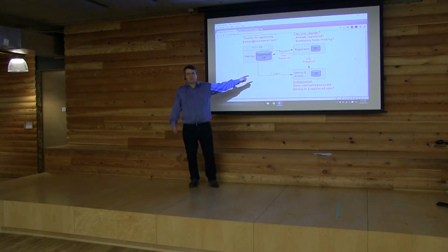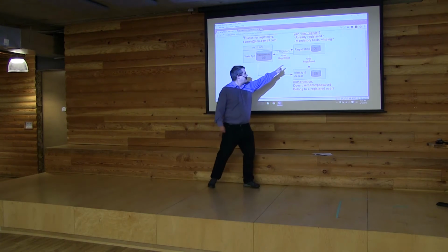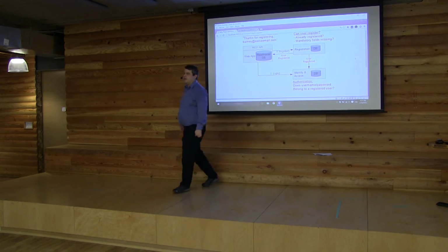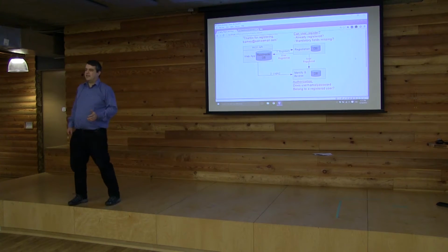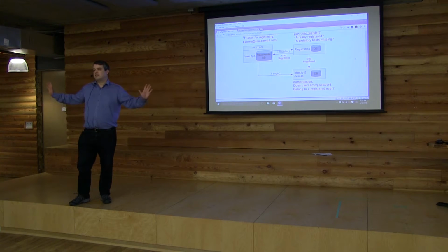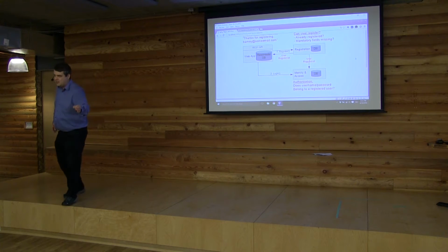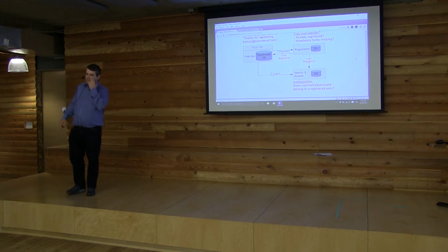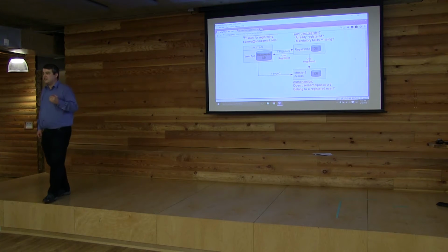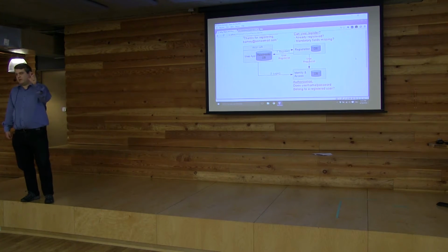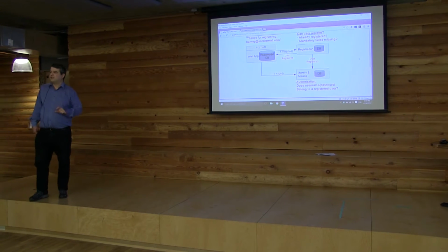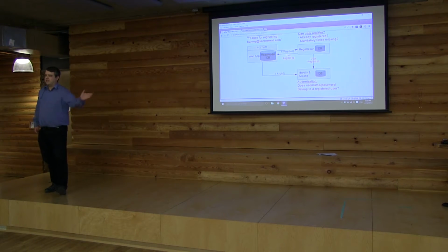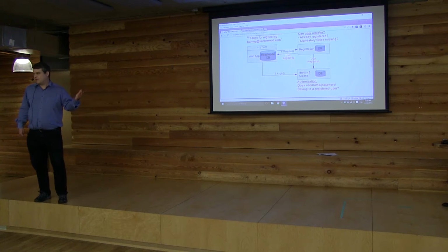This could have come from a third-party system, could have come from somewhere else. Likewise, the registration subsystem does not know anything about who consumes the events. It just publishes the event. That's it. Doesn't know who consumes it. That's very important because it cuts down on meetings, right? If you just publish the event, and that's the end of it, the only bit of coordination you need with any other team is some agreement of what should be in the event for information, right? Beyond that, as long as that's there, you're good, right?